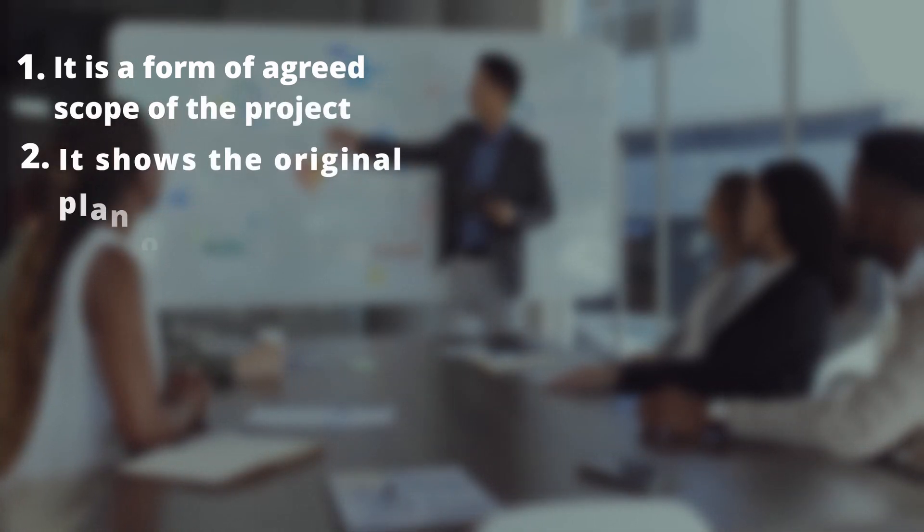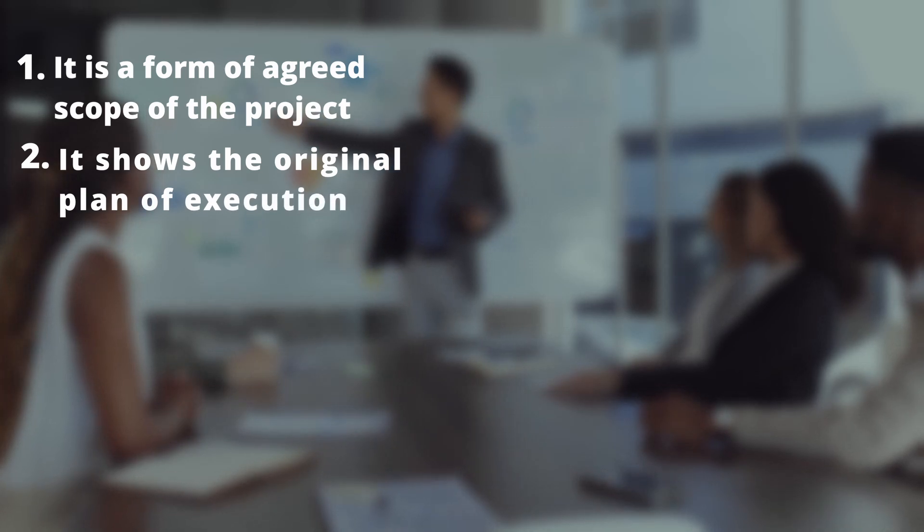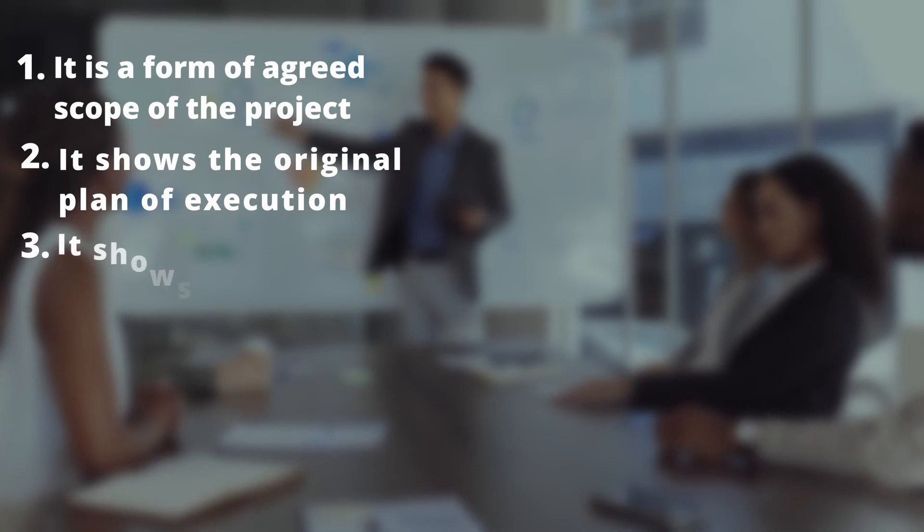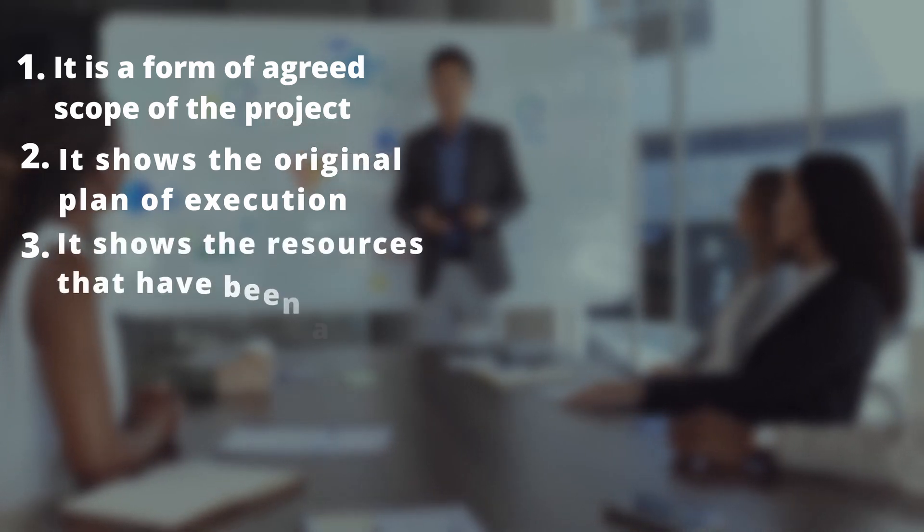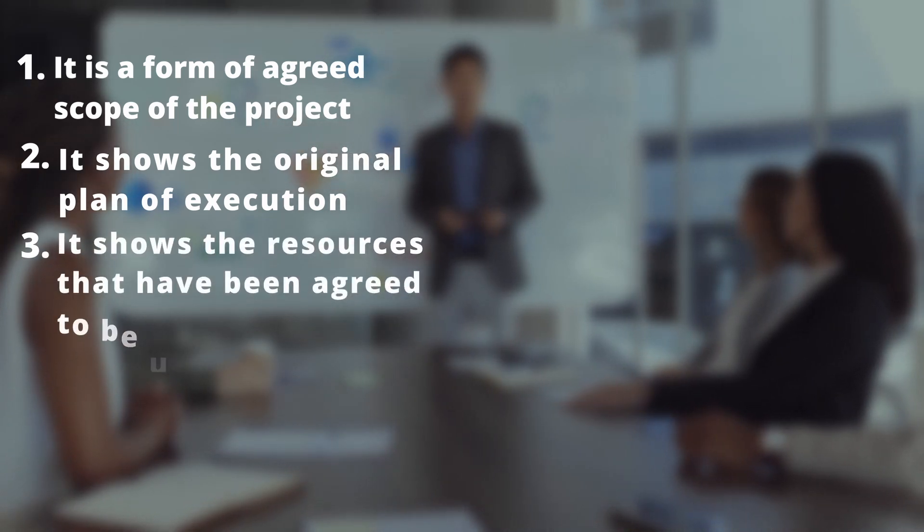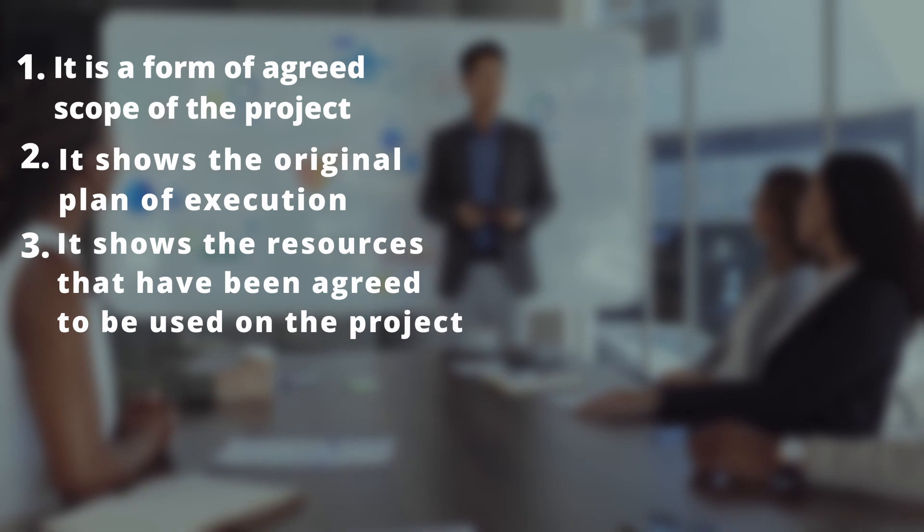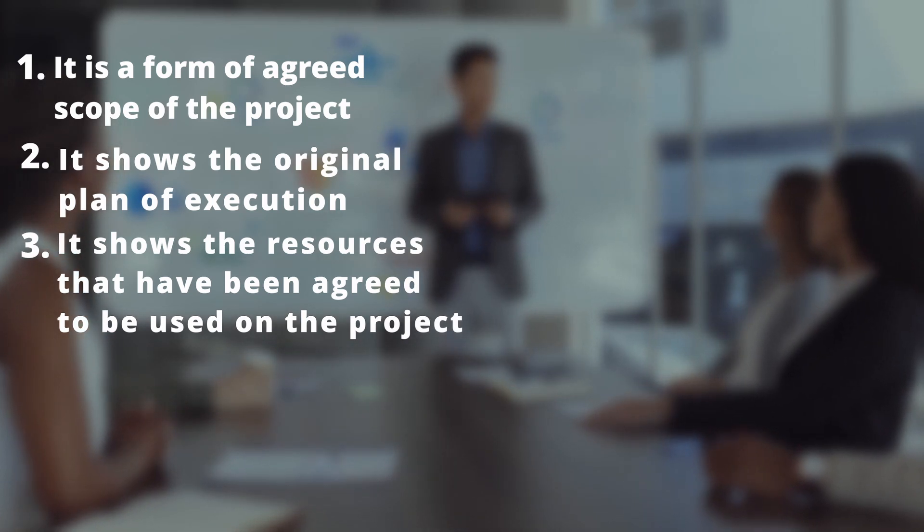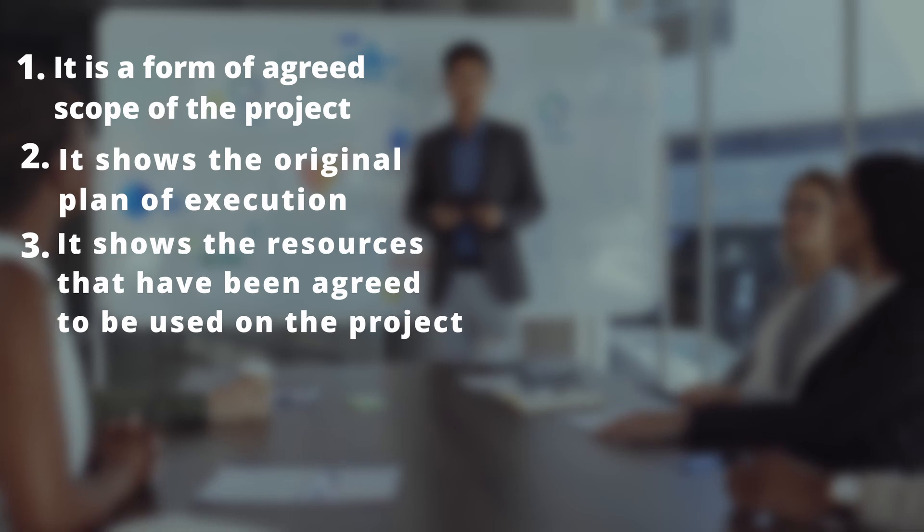Secondly, it shows the original plan of execution as all the stakeholders have agreed on. Thirdly, it shows resources that have been agreed to be used on the project. The resources can be people, machinery, money, etc.